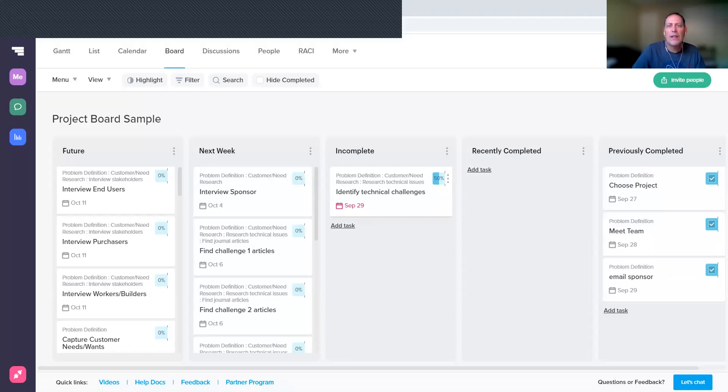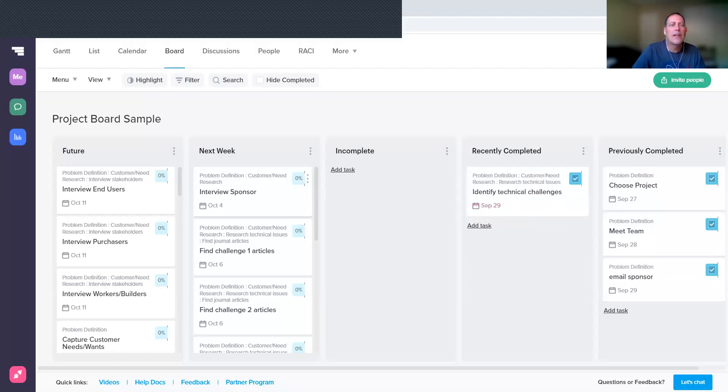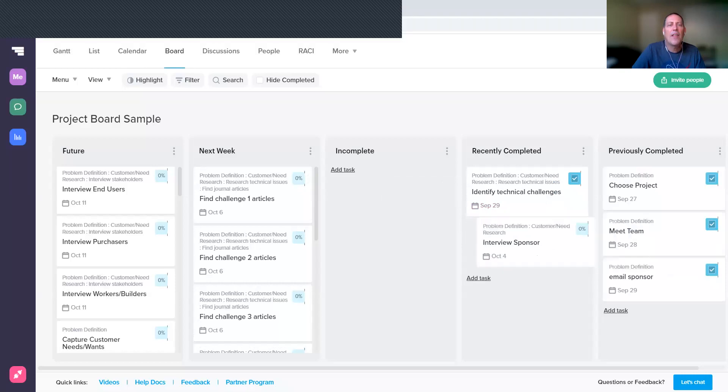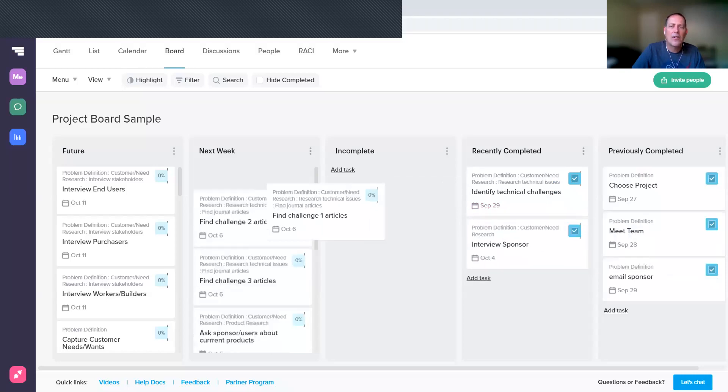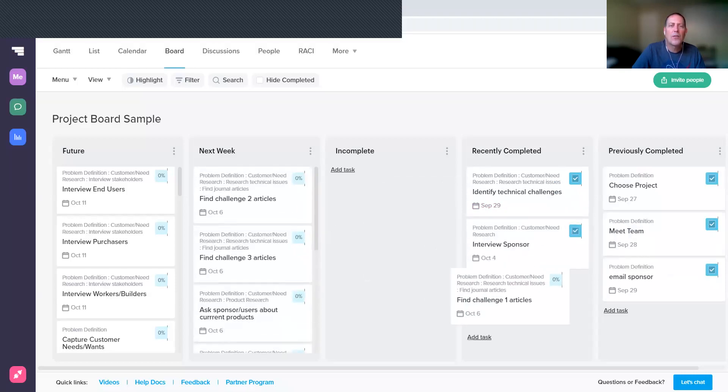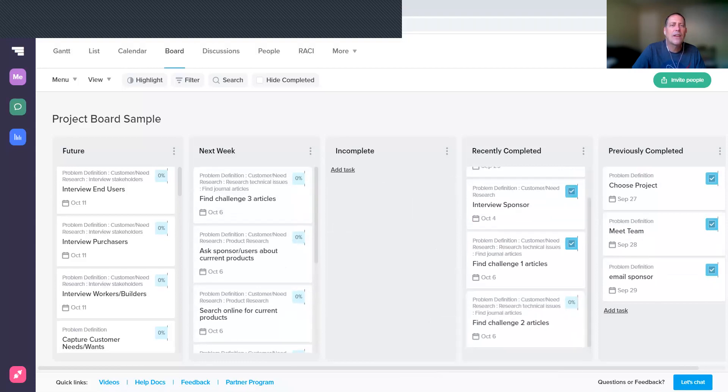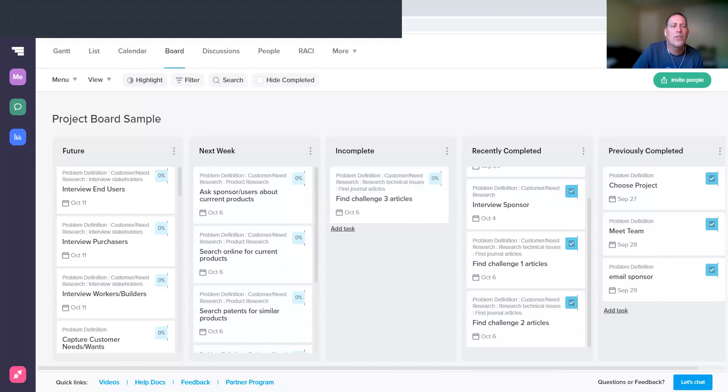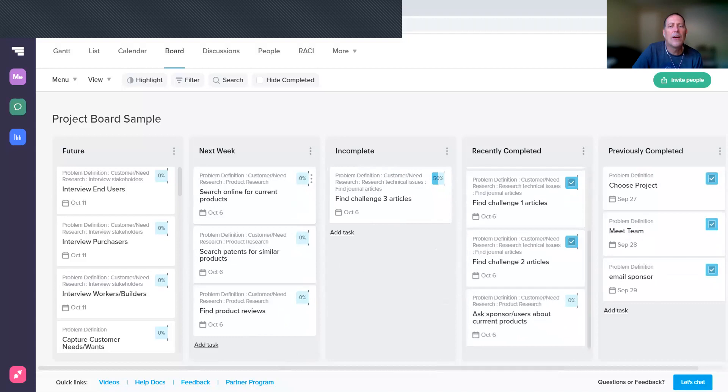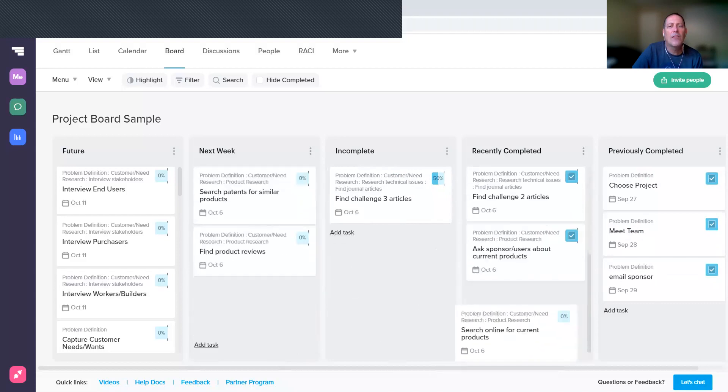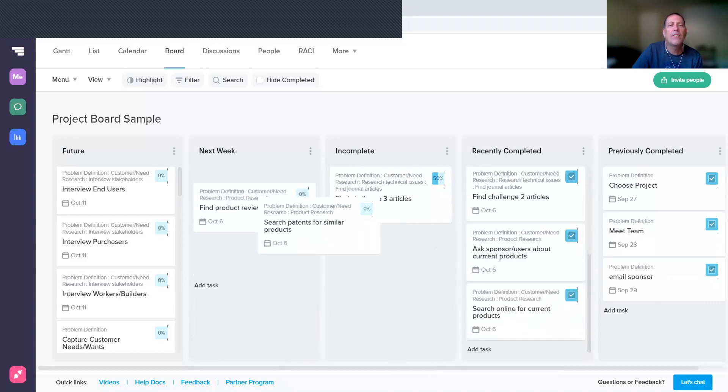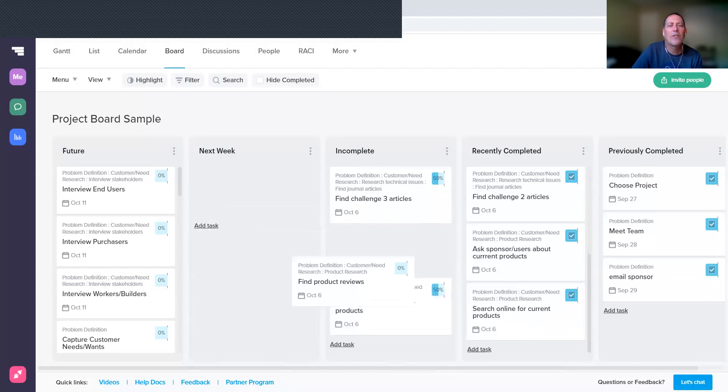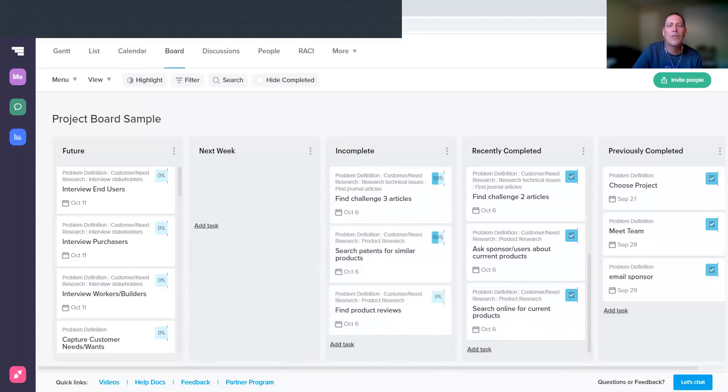This incomplete item, if it's still incomplete, you're going to leave it there. If you have completed it, you move it over to Recently Completed. And then you look at the things that you had planned for this coming week—interviewing your sponsor, let's say you have done that, finding articles related to your first technical challenge, and let's say you've done the second technical challenge but not the third, that moves to Incomplete. You've asked the sponsor about some current products, you've done online searches for products, you haven't finished your patent searching, and you have not finished your product reviews.